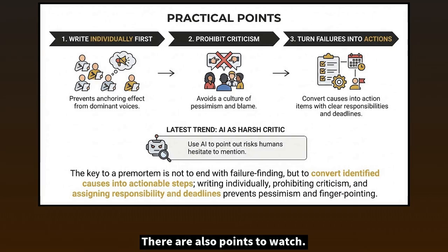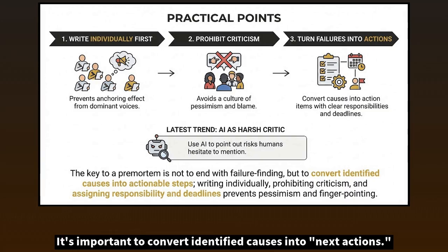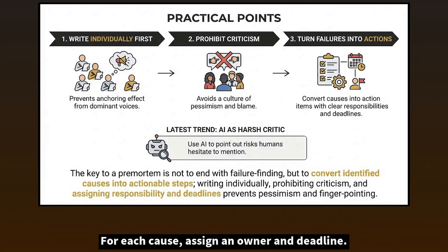There are also points to watch. Don't let the pre-mortem end with just failure hunting. It's important to convert identified causes into next actions. For each cause, assign an owner and deadline. This prevents sliding into pessimism or blame-seeking.